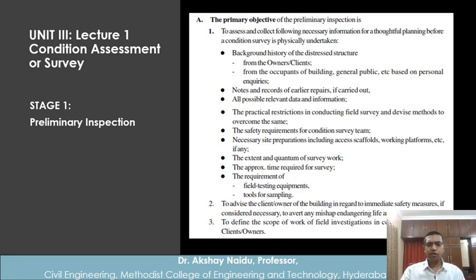That is one example. Another constraint could be that when people should not be working, we may plan that on Sunday we will conduct these site investigation. So the practical restrictions in conducting field survey, we have to identify and devise methods to overcome the same.